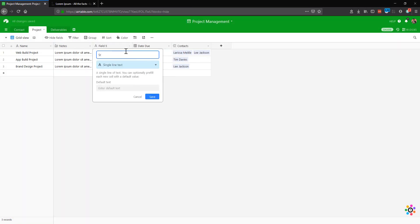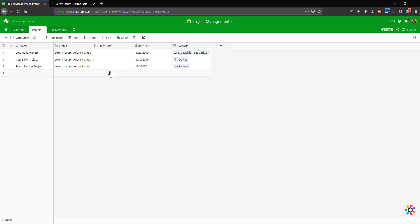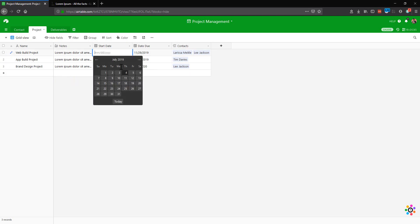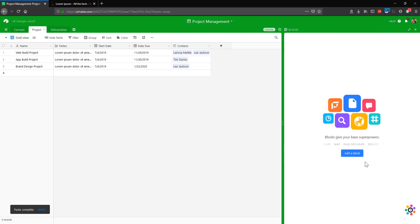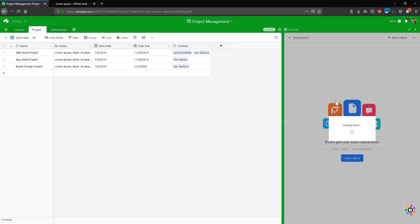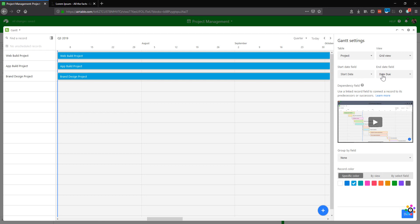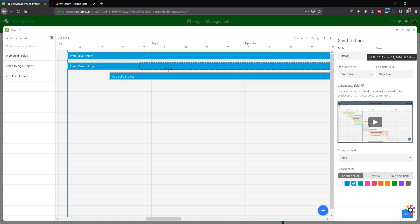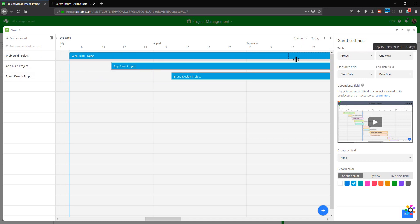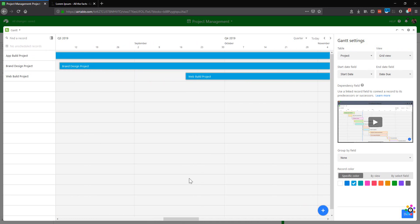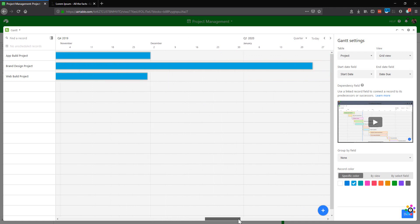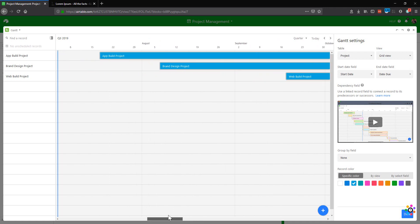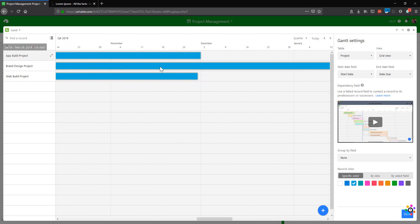What would be useful as well, if we add another field in here, we could have the start date. And what we can do is then report at a very high level. Let's say the senior project manager just wants to see what the overall progress is, or for someone who maybe is quoting on future projects and saying when they expect to be able to deliver things. If you've got start dates in here, then you'd be able to go ahead and actually create a Gantt chart. So let's do that quickly now by clicking on blocks. This is something that's only available in the premium section. And we'll click on Gantt chart, add to base. We're going to select project. It's already automatically selected the start and the due date. This allows us to manage all of these. We can drag and drop the order of them. So that we can see what the overall flow of these projects is going to be. This is just a very high level, quick glance to see where you might be at on particular projects and where overlap may be.